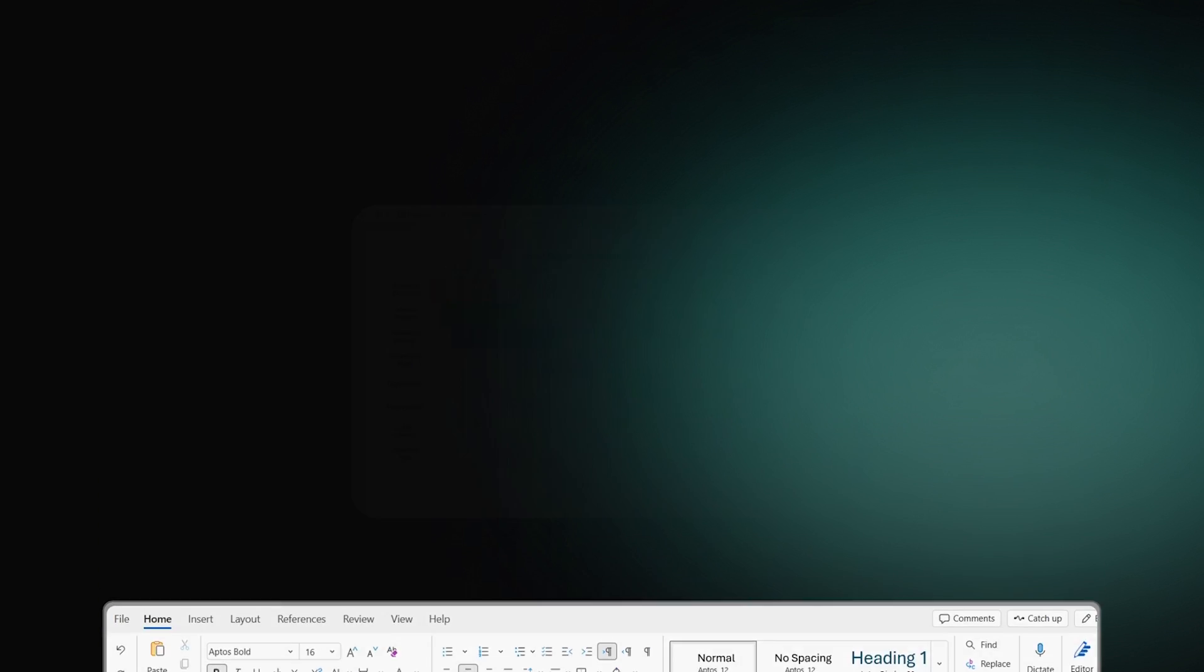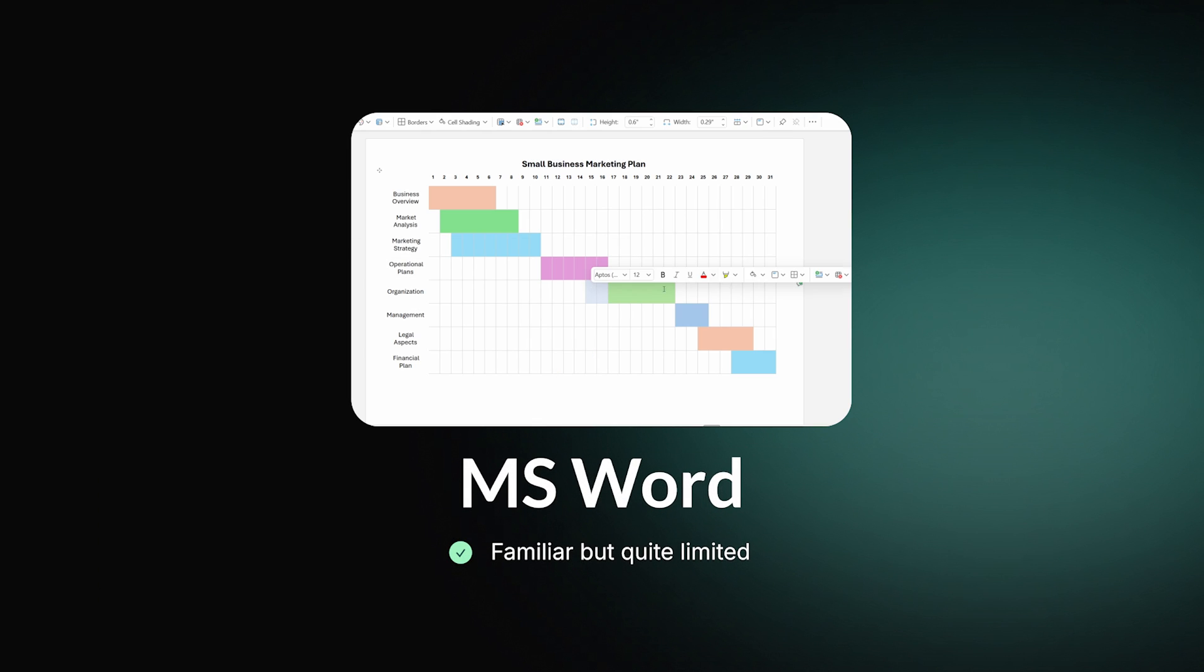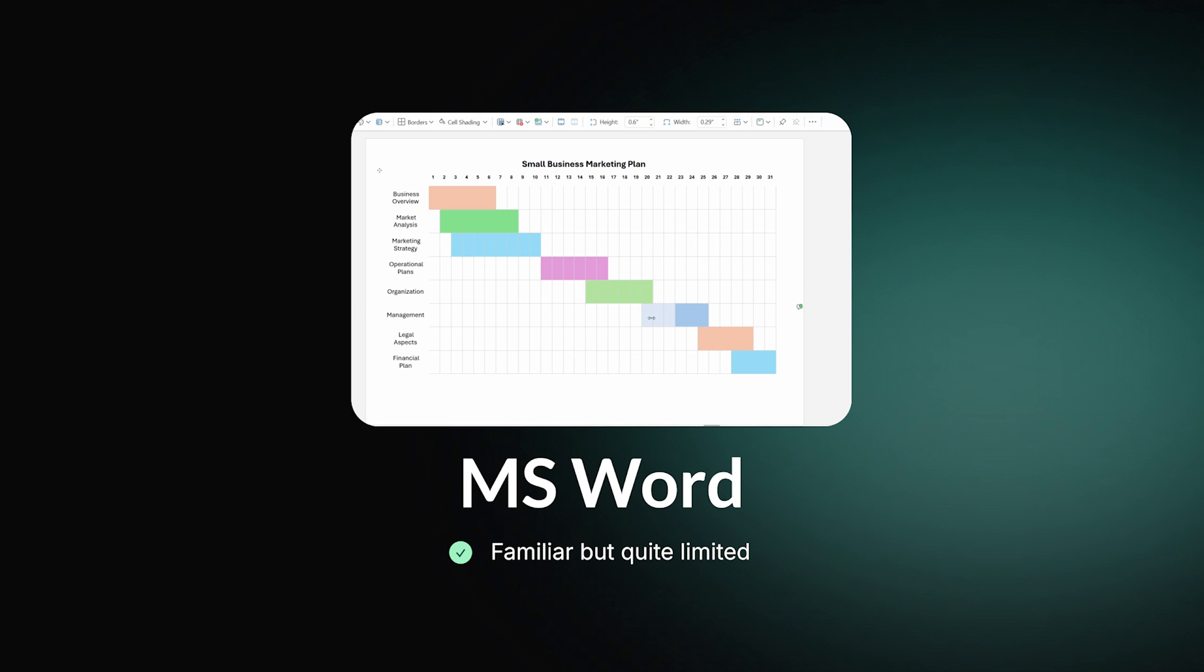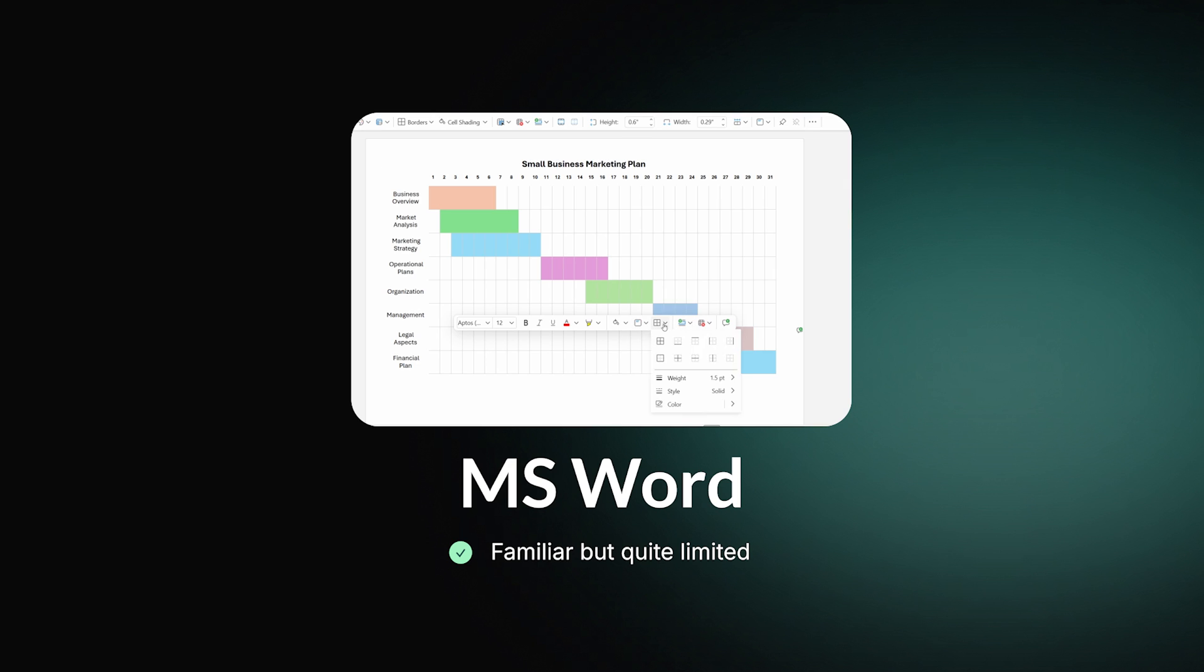As you can see, a Microsoft Word Gantt chart can be used for fairly basic management. Moreover, it can provide a proper level of flexibility. Should you need to change the duration of one task, you'll have to manually change every other.